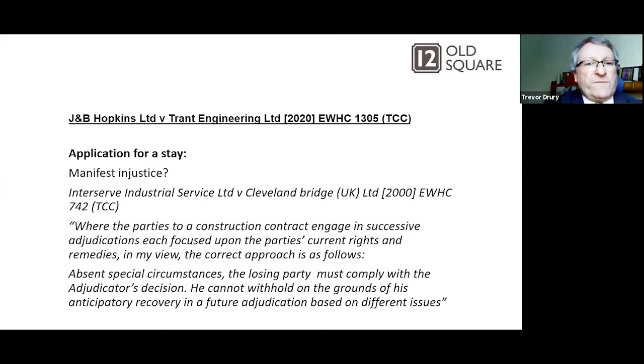There was also an application for a stay on the basis of manifest injustice. Again, they quoted Interserve Industrial Services and Cleveland Bridge from 2000. In that case, the judge said, where the parties to a construction contract engage in successive adjudications, each focused on the party's current rights and remedies, in my view, the correct approach is as follows. Absent special circumstances, the losing party must comply with the adjudicator's decisions. He cannot withhold on the grounds of his anticipatory recovery in a future adjudication based on different issues.